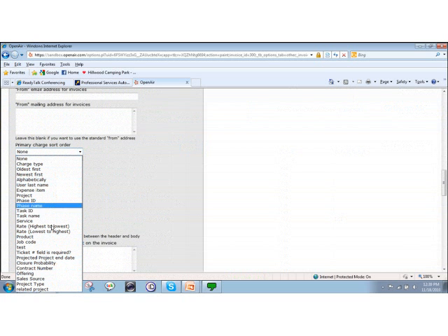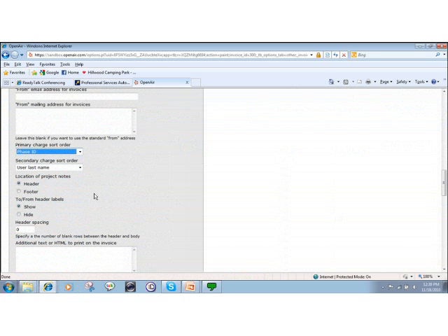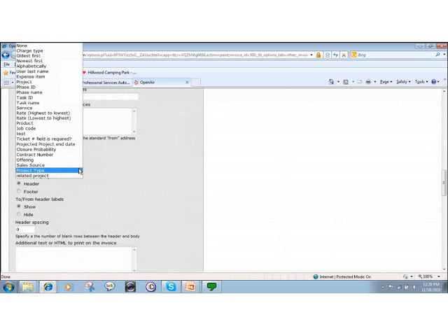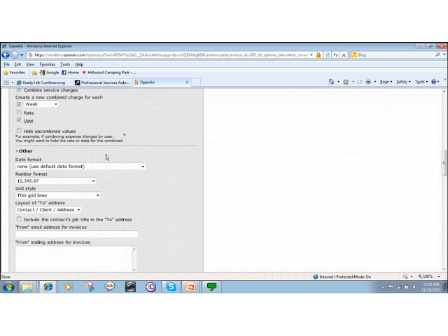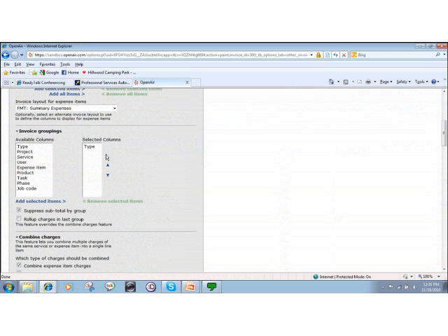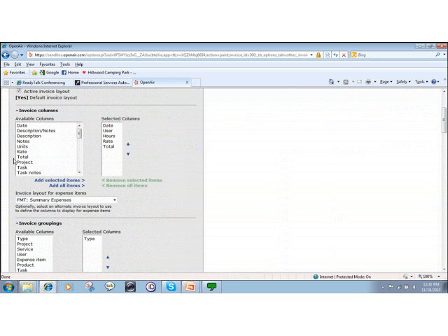Okay, but one thing that I can see is phase ID, which as a project manager at heart, I always look forward to sequential numbers on my phases and my work breakdown structure along with tasks, for example, so a task ID. Okay. Now, with the primary charge sort of phase ID and task ID, to a project manager this would be very logical. The challenge is, however, that phase ID is not currently a value that you can display on the invoice. Okay? You can display the phase, but not the phase ID.